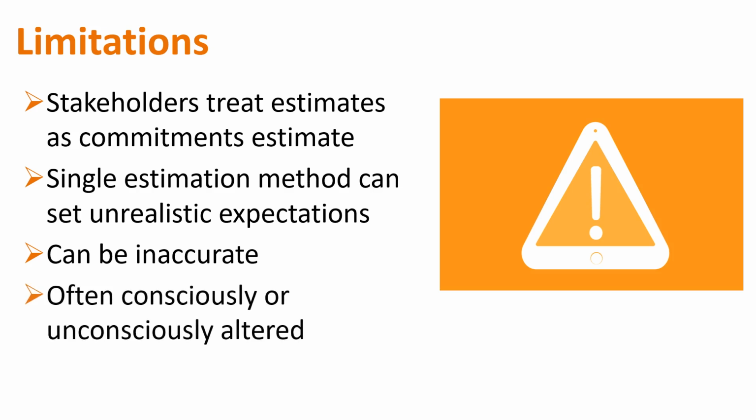And I don't know about you guys, but when I talk with developers, I always increase it by a minimum of 25%. As humans, we want to please others. As humans, we also want to feel as if we are valuable and good at what we do. And that can cause us to subconsciously modify the estimate because of that. So that's why it's always good to put that buffer. Always put the buffer because that can protect you.